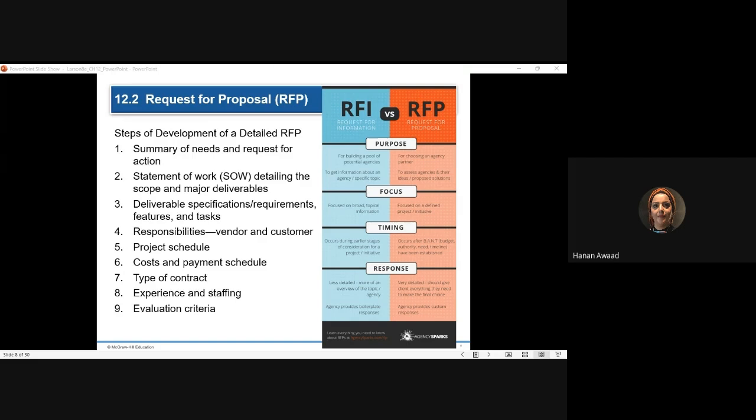Sometimes we have a technical proposal and a financial proposal. Technical proposal might include the solution they are providing, the services they are providing, the support they will give to the buyer. The financial proposal might include how many hours we will work on this solution. Of course, the technical might include the team they are proposing, their resumes or CVs, their expertise.